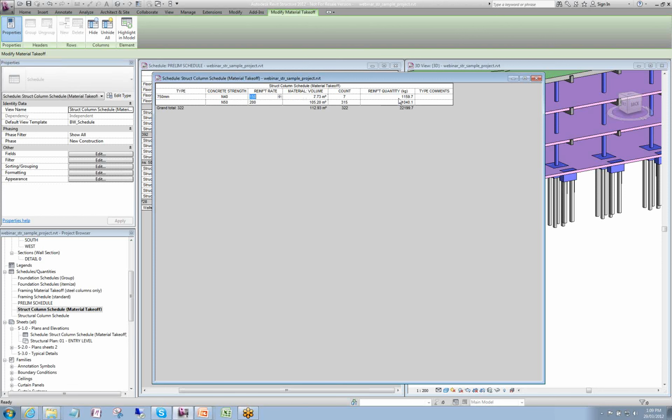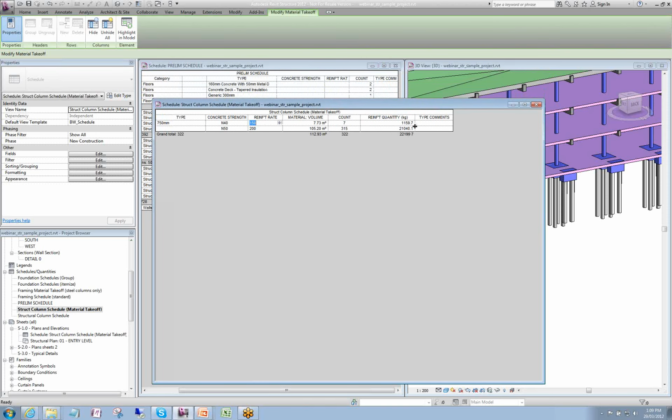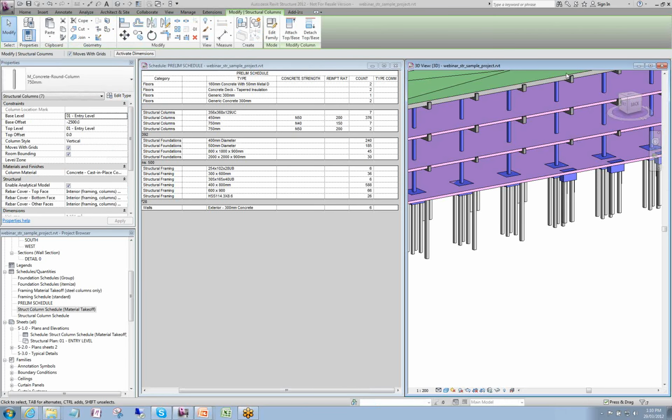And then if you apply the RIO rate to that, you can work out a tonnage of reinforcement. So again, the quantities component is for the QS, but also for your own internal check. If you ever get that query from site, how much tonnage of reinforcement was used, you can very quickly work out what it should have been. We'll do a few calculations soon.